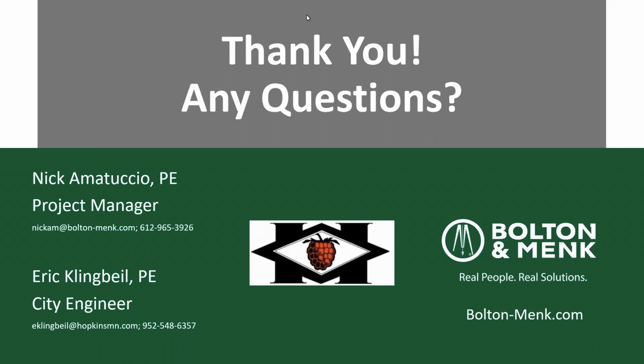Great, thank you. So the letter said 2% above what the city's interest is. So yeah, the contractor, they have a 2-year warranty on their work from when they substantially complete the project. They're responsible 2 years out from that. If anything goes wrong, they have to come back and fix it. And also, yes, it is a low bid environment, but we were lucky enough to get a contractor, assuming they get awarded next week, that we've had in town for the last several years and have had good success with. Yeah, our old service pipes, an old lead pipe is hopefully not active. We're going to chase things outside of the project area too, if we run across it.